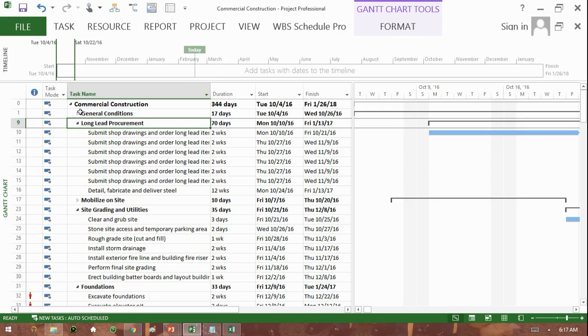Take your WBS, break it down. Of course, it's broken down into the different components down to the work package level. Take the work package, break it down into these tasks or activities. Okay? Let's take a look at a few definitions that accompany this process.